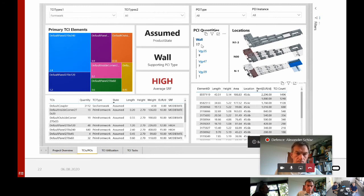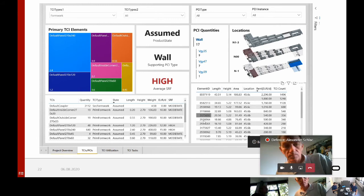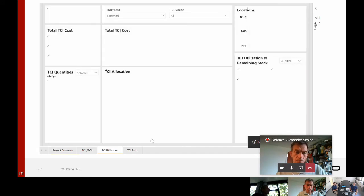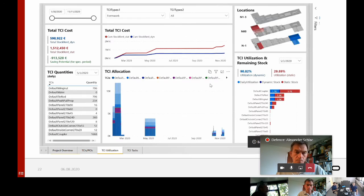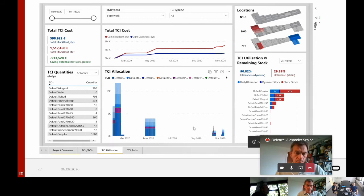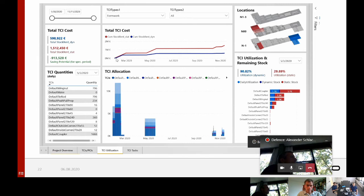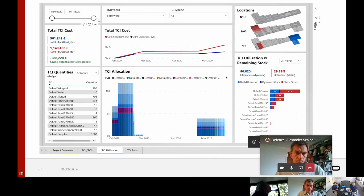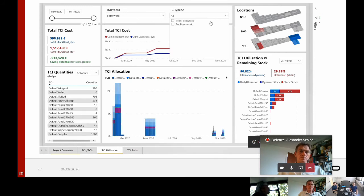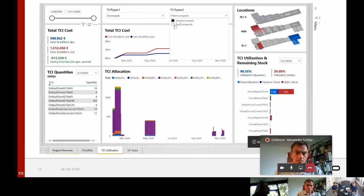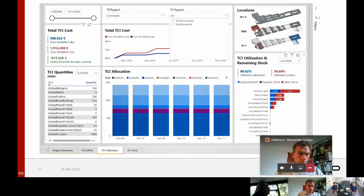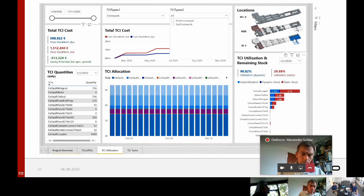The next page is the main page which I already showed in the demo project. The TCI allocation shows again the utilization plan with the different periods where the formwork is used, and clearly reveals the peak between February and March. On the top, you can filter the data with the time slicer to only review the dates you want. You can filter the formwork elements with primary or secondary formwork elements, and on the right you have a location filter to only review the locations you are interested in. The utilization plan updates to show only what is going on in the selected location.